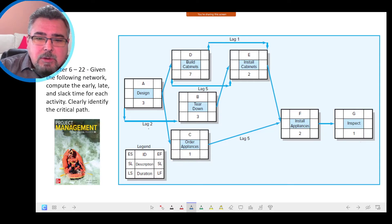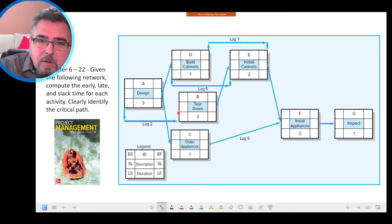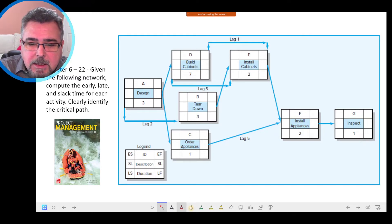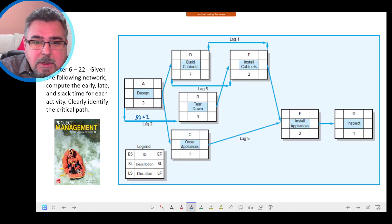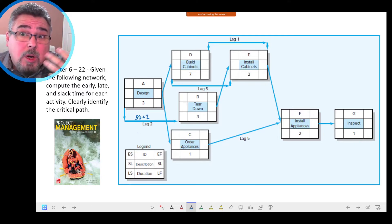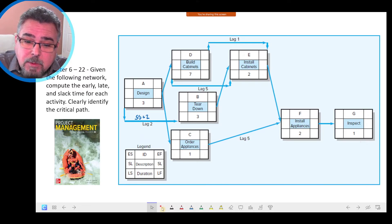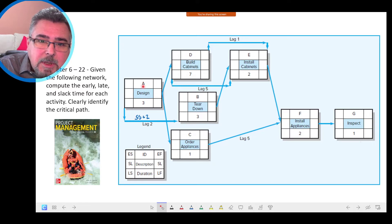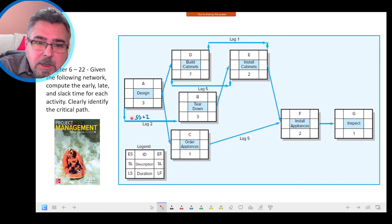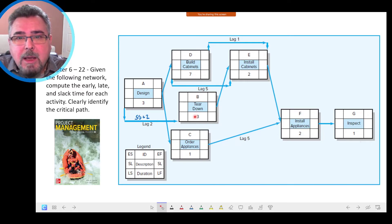The first relationship here — you can see that the line is connected to the start of Activity B. That is a Start-to-Start relationship. In the exam I will show you the arrow and put the symbol SS for Start-to-Start, and put the lag with a plus sign. It's similar to what we do in MS Project. The only difference is that in MS Project, before the relationship you put the number of the predecessor's line — in this case Activity A's line number — so it would be: SS+2 in the line of Activity B.